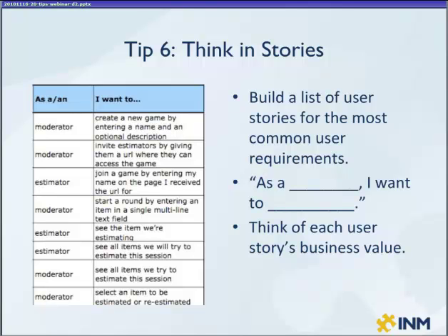So to help you to write your user stories, use your user personas that you just defined as the model for each story, and write individual stories focused on each of the possible needs. For example, if one of your user personas is a registered member of the website, then some of your stories will start with, as a registered member of the site, I want to. For example, as a registered member of the site, I want to be able to modify my online profile.